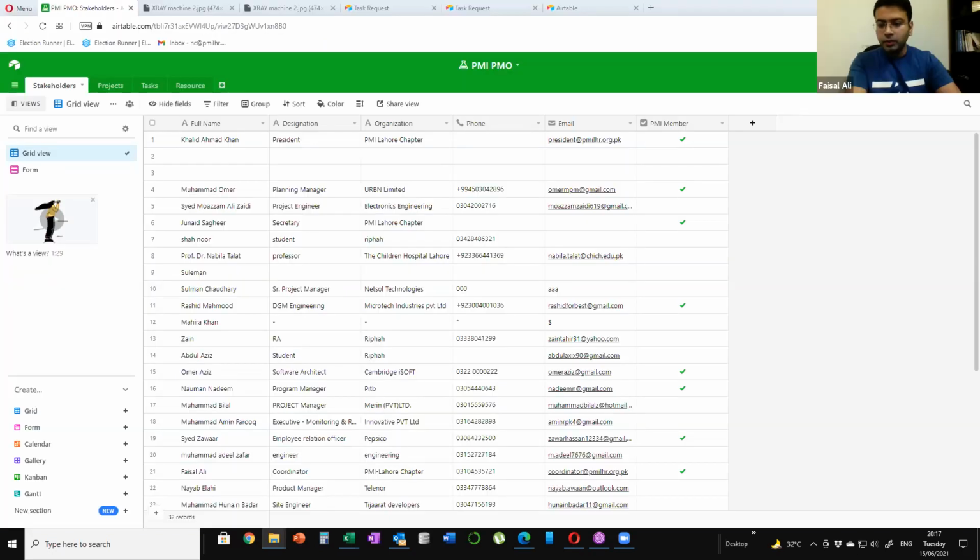Okay. Is it basically a replacement of Excel or MS Project? I would say no. Let me tell you how it works. When you're working on a project, whether you're using, as we are on our project, Primavera, or Excel, you're basically using scheduling software that tells you which tasks there are and when they will happen. But then you need a lot more details on what has to happen within each task. And you need people to be able to report on those tasks.